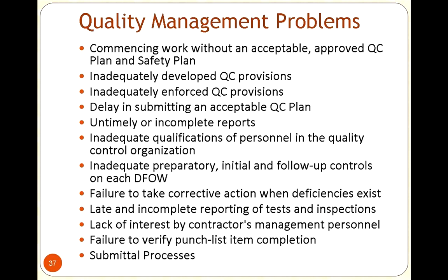And so what happened was there was nothing defined in the contract about what the floor plans were going to contain. And this guy was just adamant about, yes, I want the floor plans, but I also want to see the lines in the parking lot. I want to see the grading. I want to see the drains. I want to see every detail on it. Well, that wasn't in the scope, because in our minds it wasn't in the scope. But it didn't matter what was in our minds. It was a matter of what was on that piece of paper about what the scope of the contract would be.